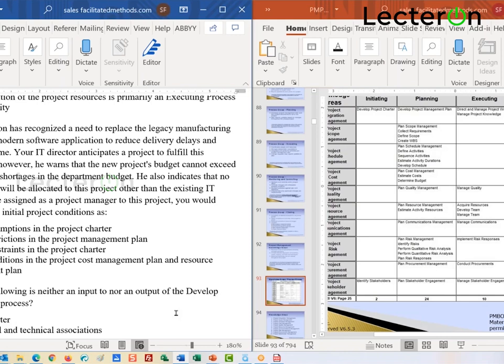This gets back to PMP terminology. And this is where sometimes how things are done in your organization are going to be kind of confusing. But when you have something like this, it's either going to be an assumption that something's going to be done, or it's going to be a constraint. Now, the first one definitely is a constraint. The second one could be considered an assumption, but it's still negative. No additional staff will be allocated. So that's really where it comes out as a constraint. So you had the right answer. C is the correct answer.